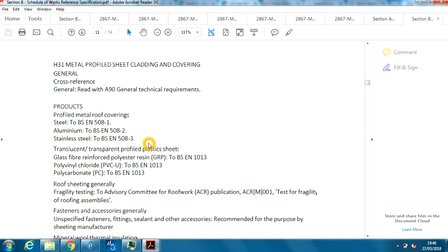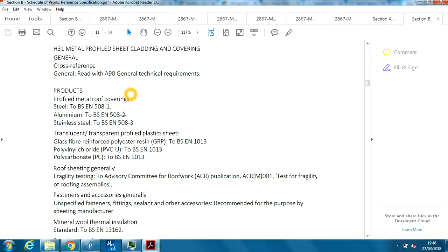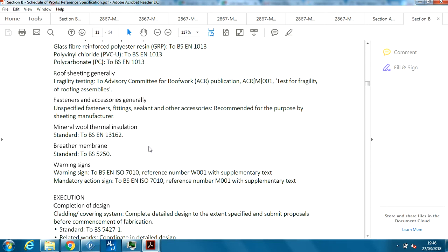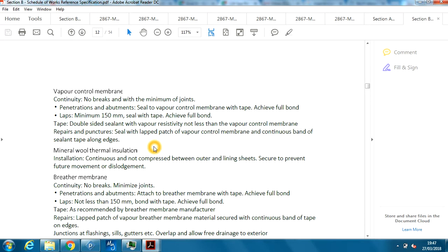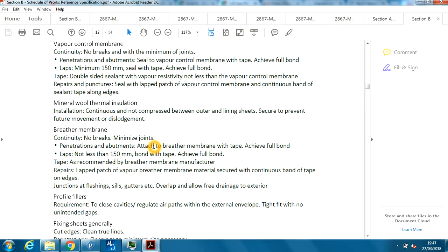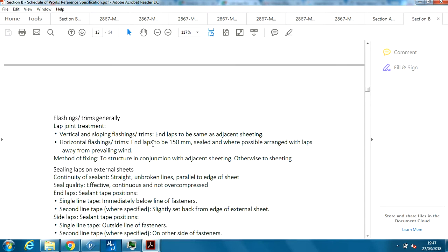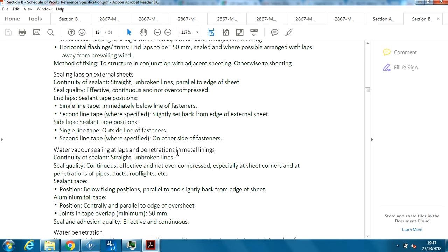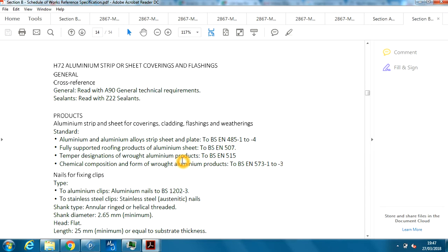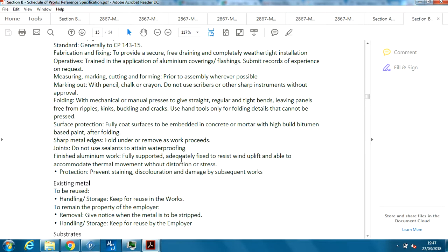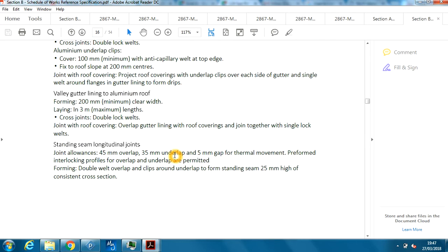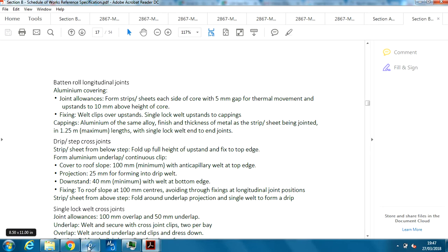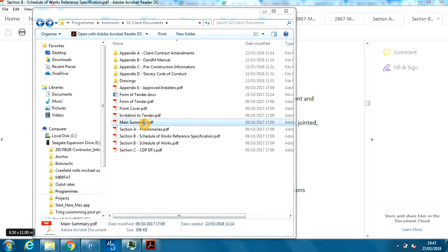When I'm building, whatever it is that I need to know, I would have visited the site, so I know all the building control requirements from just glancing through. You just eyeball it, glance through, and see what jumps out at you. But the key things I'm after are the start date and end date. Within all of this information, it's a lot of info, but you just want to get an idea of what the start date and end date for the client are, so you can start to put dates towards the program. And that is the main thing here.